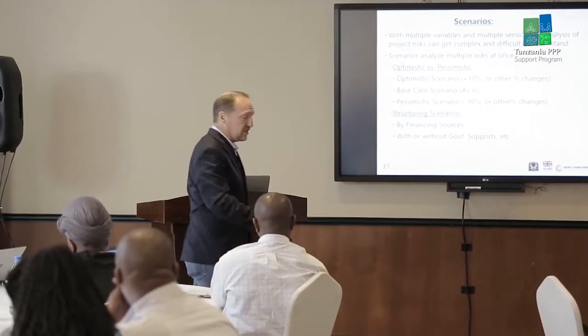You can also look at scenarios, as we've seen, maybe by, here's a scenario of the project with viability gap funding or without viability gap funding. Or here's the scenario of the project on a small scale. We maybe want to look at the project on a medium scale, meaning a larger project, more costs. This is again why we need to think about fixed and variable operating costs, and then maybe a large scale version of the project.